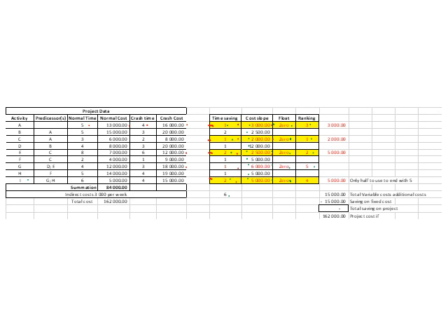Our cost saving is 1 week, so we save 2,000 rand there. Then on our second ranked item, we can save 2 weeks, which has a cost implication of 5,000 rand. Our third item, we can save 1 week again, and it has a cost implication of 3,000 rand.